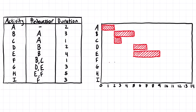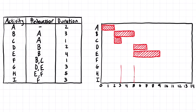Now taking a look at activity F, it can't start until B and C are both finished, and it's one day long. So we find out where B finishes — it's going to finish here at the end of the fifth day — and it also depends on activity C, which finishes here at the end of the third day. Activity F can't start until both of them are complete, so it has to start after this point, and it is just one day long.